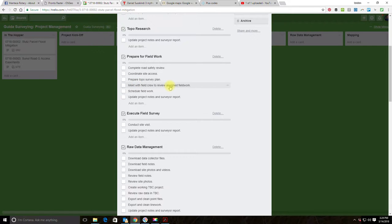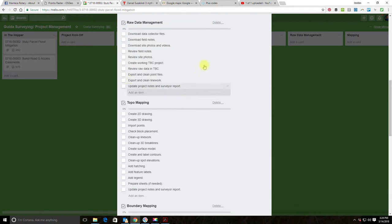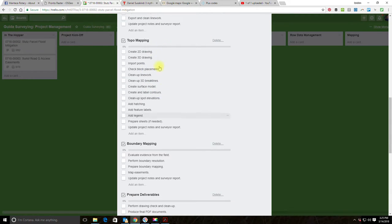We're also removing monument searches, filed survey maps, and as-built plans from the field work checklist since we're not doing boundary work. We keep: meet with the crew to go over field work, schedule the field work, update the report, and execute the field survey. For raw data management, we review the list — download data collector files, download field notes, site photos and videos, review field notes and site photos, create a working TBC project, review raw data in TBC, export and clean point files and line work, update project notes and survey report. All items stay.